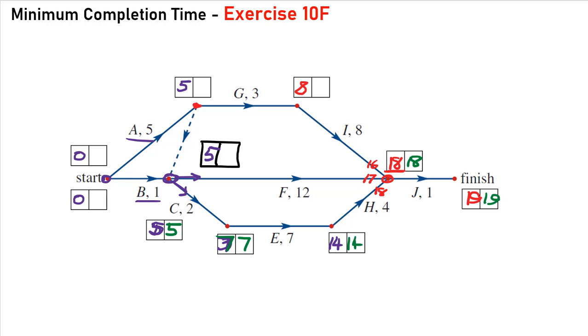Now you might notice that these numbers here are all the same. And the significance of that, I hope you realise, is that this is our critical path, or will make up part of our critical path. If we have a look at now, 18 is the EST here. If we take off 12 here, the EST at this point for F is 6. That means we could start F 1 hour after we start C because of this 1 hour lag time here, and still get to here in a sufficient time to start this last project.